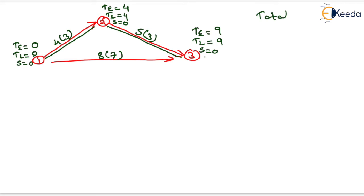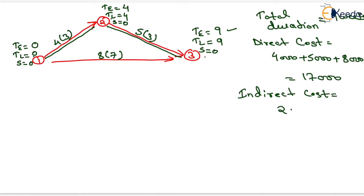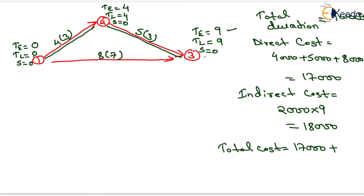The total project duration is 9 weeks. Direct cost equals the sum of all normal costs: 4000 plus 5000 plus 8000, which equals 17,000 rupees. Indirect cost is 2000 per week multiplied by 9 weeks, which equals 18,000 rupees. Total cost equals 17,000 plus 18,000, giving 35,000 rupees as the total cost of this network.